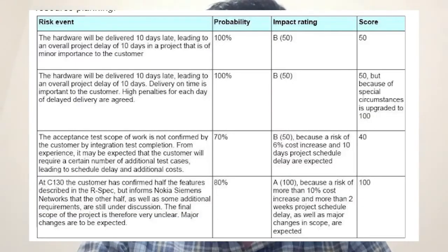Yes, and the next is stakeholder register. Described in section 13.1.3.1 in PMBOK 6, the main output of the identify stakeholder process is the stakeholder register. This document contains information about identified stakeholders that includes but is not limited to identification information, assessment information, and stakeholder classification. You can see the example of stakeholder register on the screen.